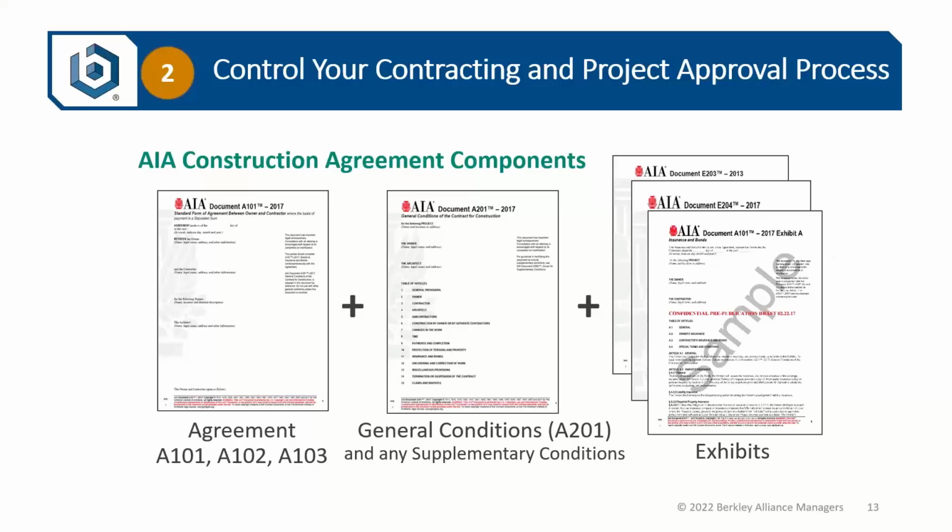Amongst the documents committee, there was a specialized group working on this for a number of years. Construction insurance has become complex. My colleagues in Berkeley Construction Professional deal with this all the time. There are many different products available, and your client's insurance broker should work with the owner to determine what levels of insurance and types of insurance they have. It'll be a separate exhibit, rather, because of the definition that's necessary. Now, in A201, there are basic insurance requirements defined: CGL, auto, workers' comp, things like that. But what A101 further defines are things such as professional liability insurance, and contractors have professional liability exposure, and that's what we sell in terms of Berkeley Construction Professional.